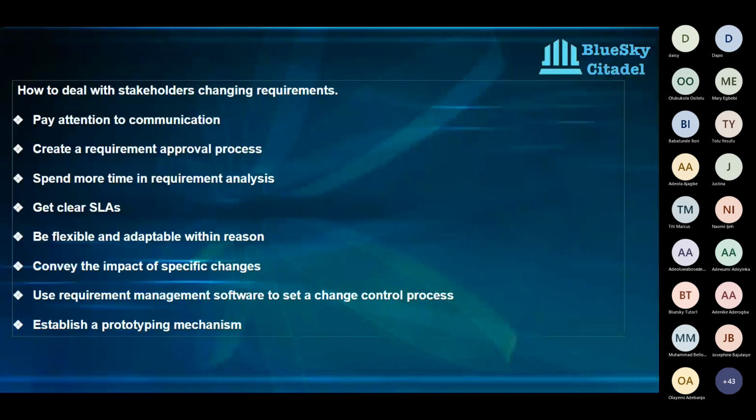So I went into that call today and I said, well, based off the estimate that the developers have given on this particular product, we can do it. We can definitely do it. But we will need at least two extra sprints to complete it. And what that means is that this third product, we will not be able to deliver realistically by the end of March, but we can deliver by the end of April. I'm waiting for that decision back tomorrow to see if they're going for that or if they're coming up with another suggestion. But what I've done is I've highlighted the risk to delivery to them, but I've also said, well, we could do it this way. We could complete it, but the guys would need at least two more sprints for that completion to happen.